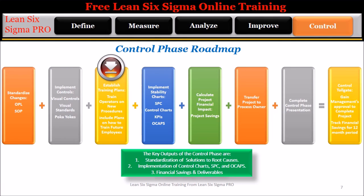Step 3: Establish training plans — train operators on new procedures. In the training plan, include how future employees will be trained and the frequency of repeat training. Step 4: Implement stability charts, statistical process control, control charts, key process indicators, and out of control action plans, OCAPs. These methods will be new to the people on the floor, so the team will need to train them in these new methods and ensure the people understand and implement these new procedures as a part of their daily work.